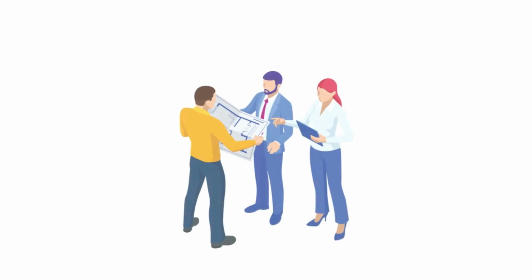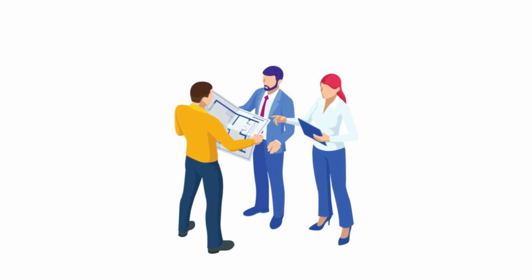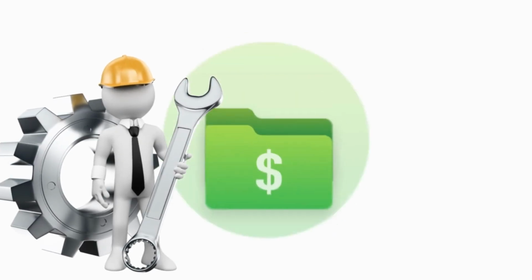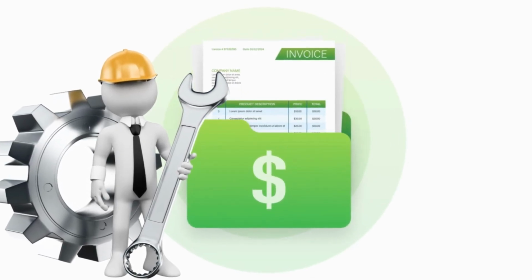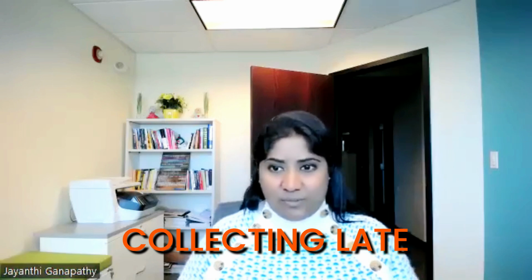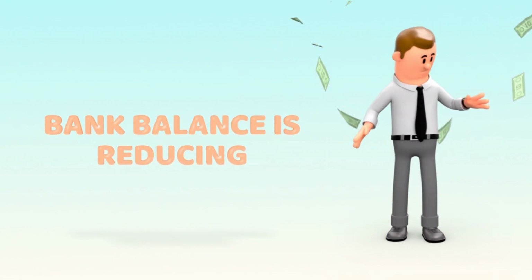Most builders work with subcontractors, so you have invoices from your subcontractors that you have to pay on time. Most of them want immediate payment. So you're paying fast but collecting from your customers late. With that, the funding is really coming from you. Your bank balance is reducing.